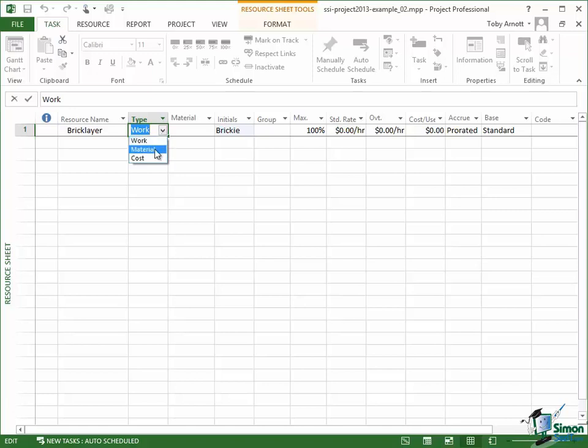Materials are the resources that get consumed in the building of the house. So this will be things like bricks, window frames, concrete, cement, mortar, and so on.